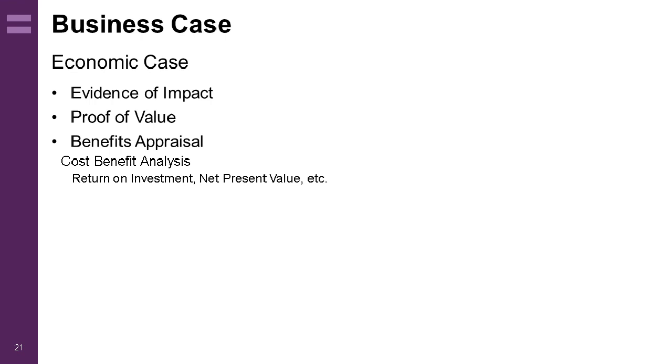Benefits can be described as cash releasing or non-cash releasing. In my experience, most are usually the latter, i.e. the savings are simply absorbed or reinvested, usually by way of increasing capacity to increase output. After the financial benefits or investment costs, if no savings, would come the non-financial benefits. These may be quantifiable or not. They can include things like customer satisfaction and staff satisfaction, which, although qualitative, can be quantified using surveys, for example.